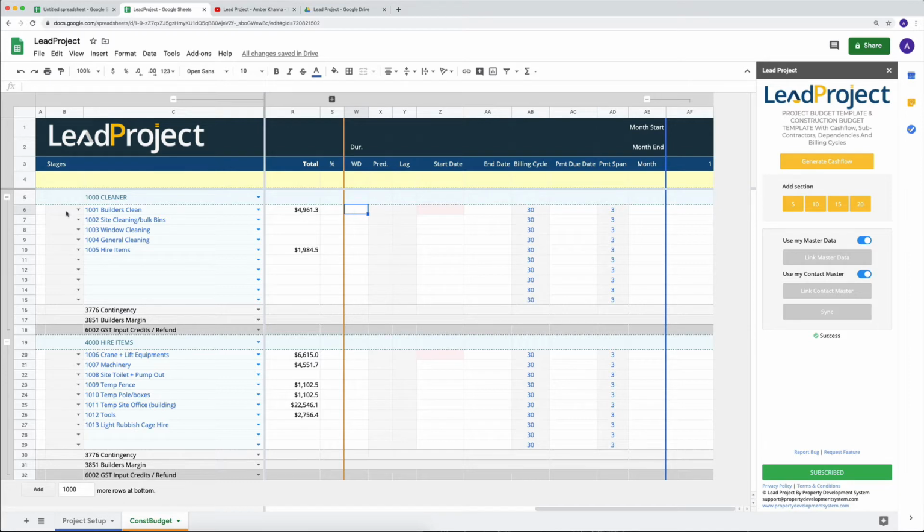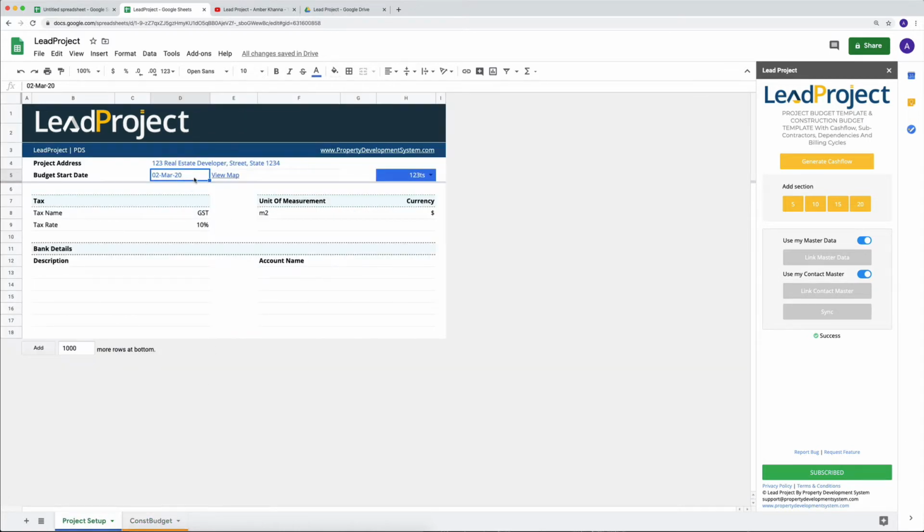So if it's just a once-off invoice, the work is going to happen within one day. So all I have to do is put in one over there. At this stage, there is no predecessor and there is no lag with this. Now, this first column, which is the first start date of every section, is going to come out with a red shading, and it is with a purpose, because you always have to have a date in here. The first time you start to generate this, you have to make sure that this first date is never before the start date of your project.